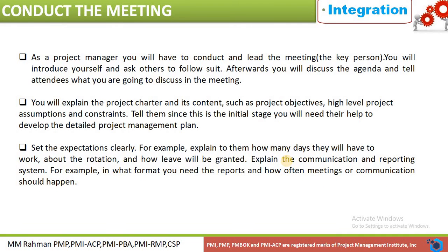Then conduct the meeting. As a project manager, you are responsible for leading the meeting. Introduce yourself and ask the others to follow suit. Afterward, you will discuss the agenda and tell the attendees what you are going to discuss. You will explain the project charter and its contents, such as project objectives, high level assumptions, and constraints. Tell them that since the initial stage we will need their help to develop the detailed project management plan.